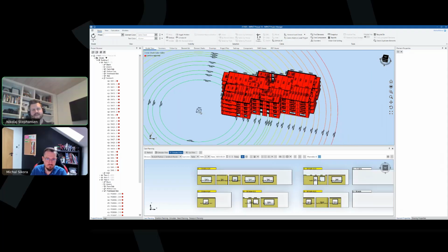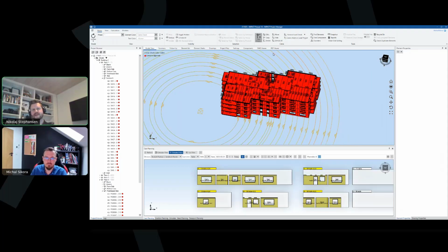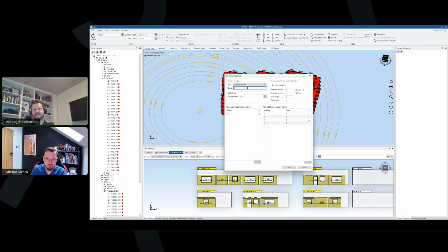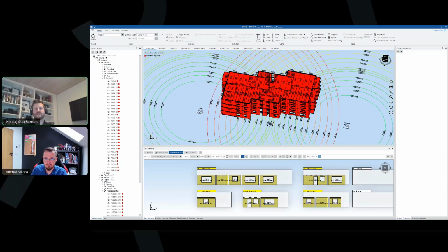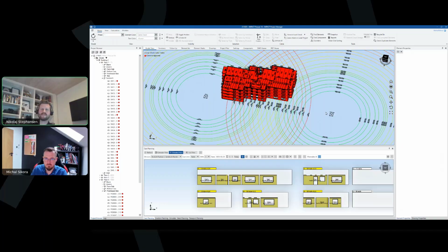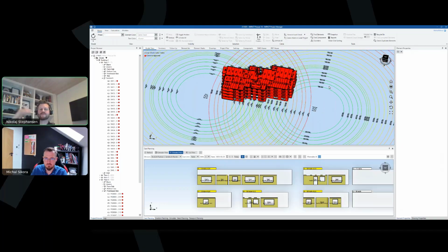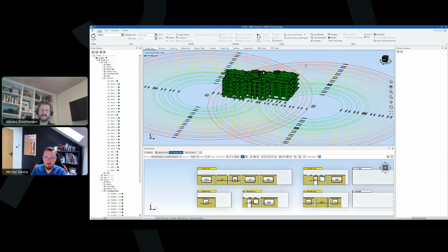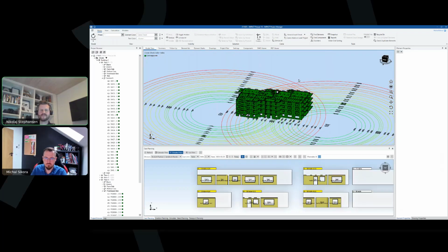Some extra information on it also is that, of course, you can activate it or have it not being active on floors and other buildings. But there's also a time aspect, which Michal will come into later, where you can say, okay, when we're lifting the elements, how long does it take to lift when we're lifting up on floors which are higher up or lower down? So that'll help us with the planning of the project itself. There you go. And now we can see everything is green as well. And you got a little extra bonus information while Michal was planning out his building site.